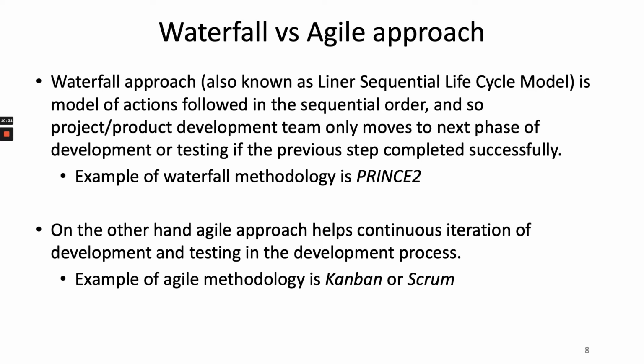The waterfall approach, also known as the linear sequential life cycle model, is a model of actions followed in sequential order, so the project or product development team only moves to the next phase of development and testing if the previous step is completed successfully. An example of waterfall methodology is PRINCE2.